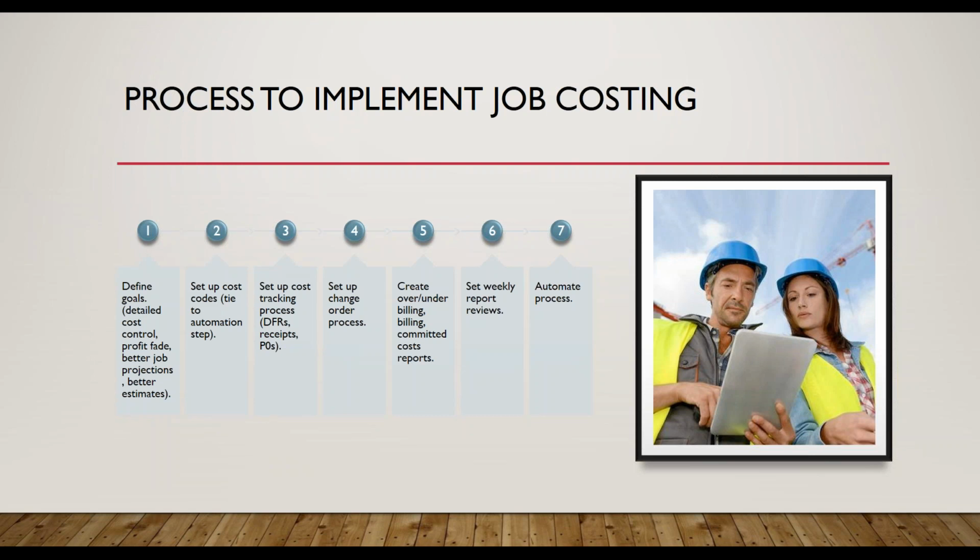This next one is about cadence also, watching things regularly. Set a weekly report review with key people, whether, if you're a larger company, project managers, accountants, the owners, the GM, ops managers. If you're a small company, it's just you and the key guy. You two sit down and review this stuff and decide what's absolutely necessary. By the way, this gives you a chance to take action before the project is done if you spot issues.